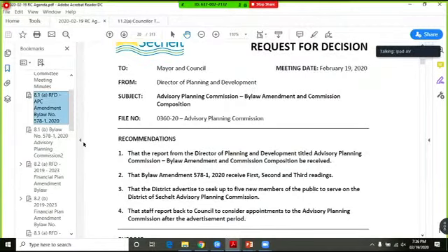What we're amending in the financial plan, this can be resolutions by council, budget transfers between departments, or emergency items as they arise. This could be for resolutions by council, it could be confirmed grant funding or reports to council throughout the year to request for grant projects, and the grants are received, which weren't captured originally in the financial plan. So now we come back and add them to the financial plan. So majority of the recommendations today were provided by council resolution throughout 2019. Some other means of these changes could be from council directed initiatives. So council could request to allocate funds by decision in council meeting and spend it against the contingency. So that could arise throughout the year as well.